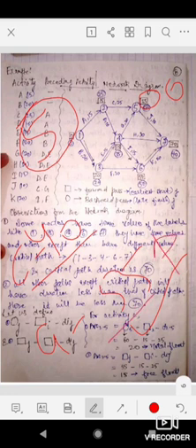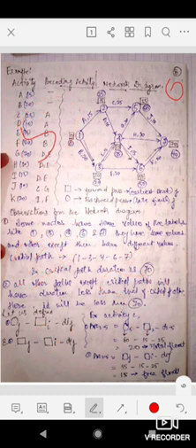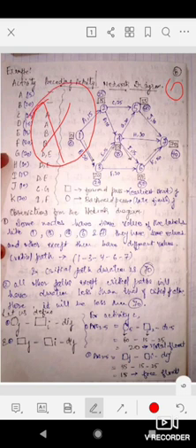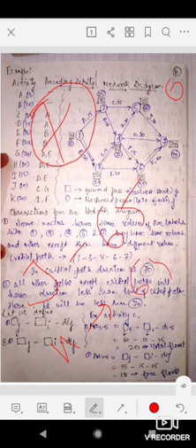Now come to node 7. Activities C and G are both done after 55 days. 55 plus 10, J will be done after 65 days. H will be completed after 35 plus 30, which is also 65 days.